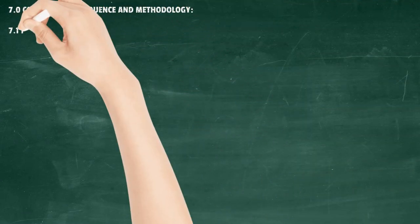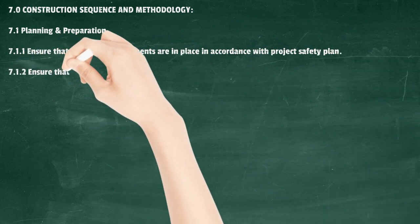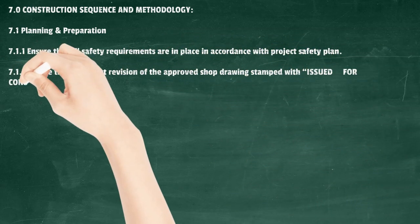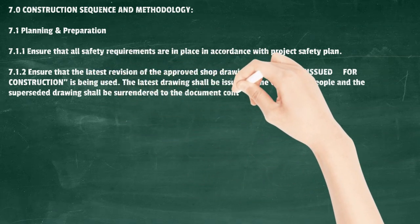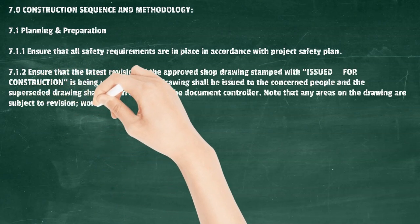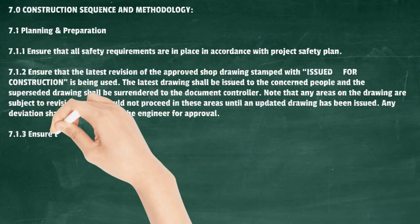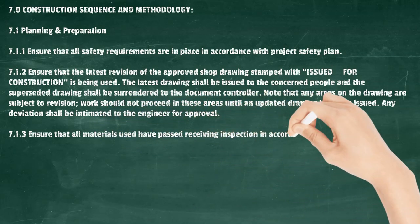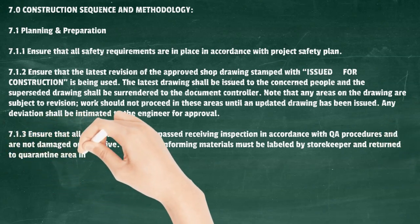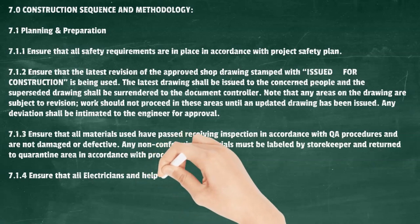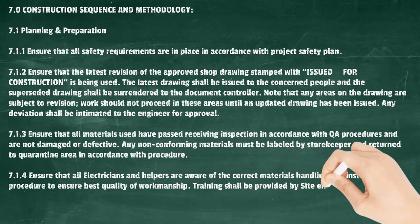Construction Sequence and Methodology - Planning and Preparation: Ensure all safety requirements are in place per the project safety plan. Ensure the latest revision of the approved shop drawing stamped 'Issued for Construction' is being used; superseded drawings shall be surrendered to the document controller. Any areas subject to revision shall not proceed until updated drawings are issued, and any deviation shall be intimated to the engineer for approval. Ensure all materials have passed receiving inspection and are not damaged or defective. Non-conforming materials must be labeled and returned to quarantine. Ensure all electricians and helpers are aware of correct handling and installation procedures. Training shall be provided by site engineers as required.